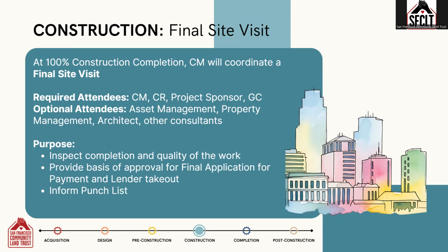While not required, the CM may also invite someone from the asset management team, property management team, the architect, or other relevant consultants. The purpose of this site visit is to inspect the completion and the quality of the work and provide a basis of approval for the final application of payment and lender takeout, and to inform the final punch list, either by confirming items that have been completed or by adding new punch list items.